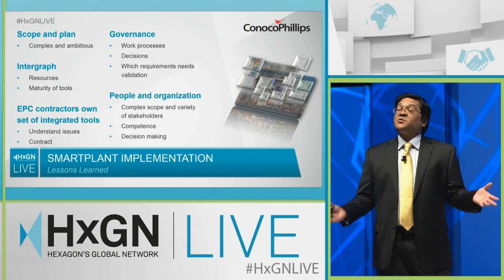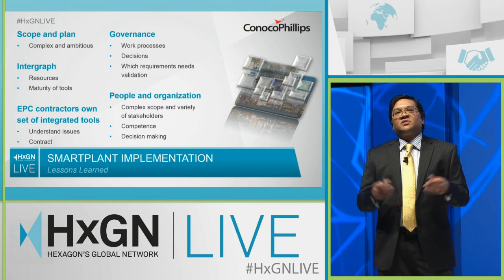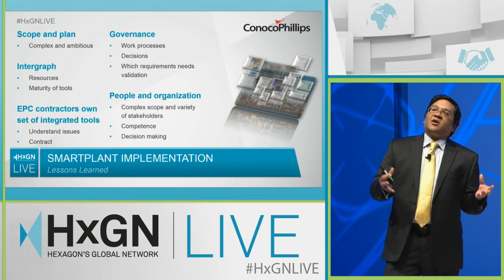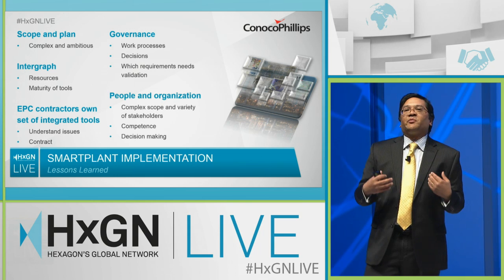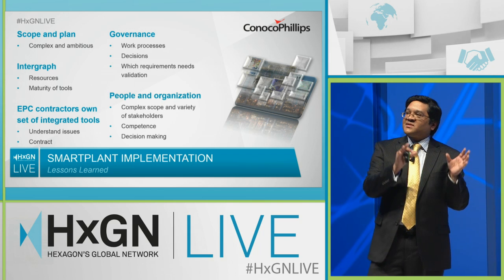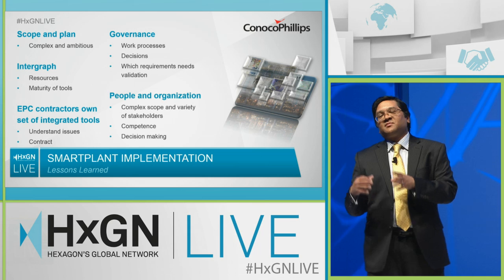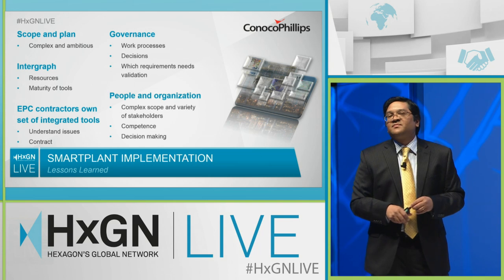EPC contractors have their own systems that they're used to using and that they prefer to use. So it's important to bring your EPC contractors along when you implement solutions like this. Generally, the more experienced contractors, the ones you really want to work with, are the more embedded in their own systems, and it's harder to break them out into new systems. So you have to do kind of a two-tiered job. One is to sell the benefits of the intelligent data systems that you're trying to set up, and the other is from a contractual basis to make sure that the data management toward intelligent data is embedded in the contracts.